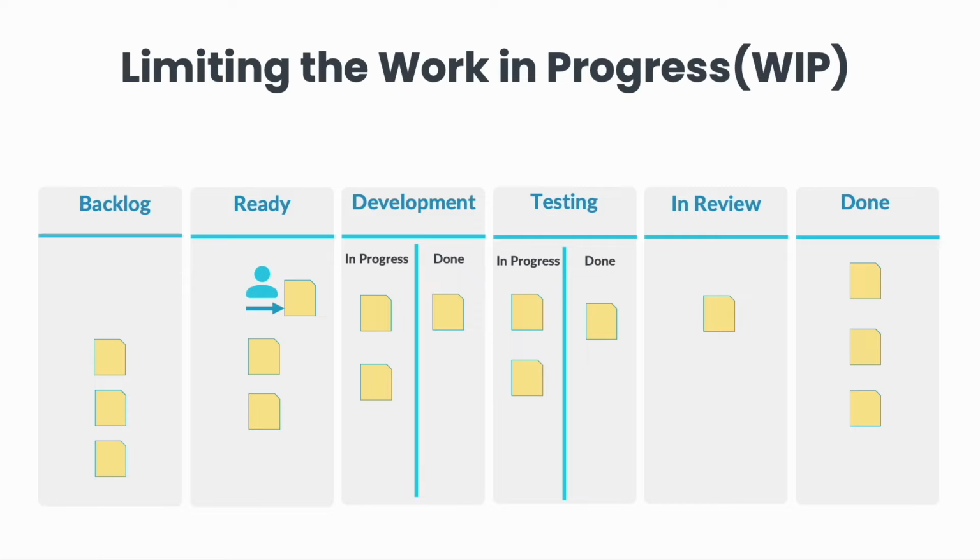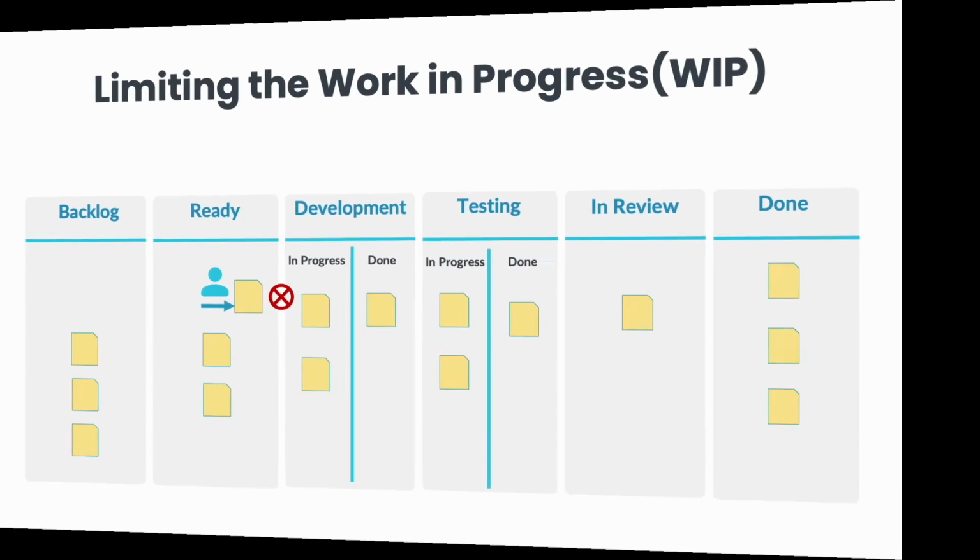As we mentioned in our Kanban intro, Kanban prioritizes flow of work, which has been shown to increase productivity. In order to accomplish this, we set limits to how many work items can be in progress at a time. It doesn't benefit anyone to have lots of work in progress and not to accomplish anything at the end of the day. The work in progress limit is applied to our Kanban workflow, which means we should have limits for our main statuses. Let's use our conceptual board to better explain this concept.